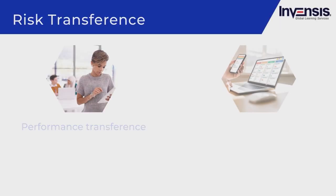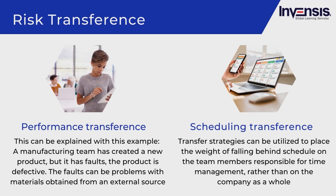An example of performance transference: if a manufacturing team has created a new product with faults, those faults may not be due solely to manufacturing concerns but rather to problems with materials from an external source. The company can pass the consequences to the outside vendor responsible for delivering the product materials by demanding the vendor cover the expenses associated with product faults.